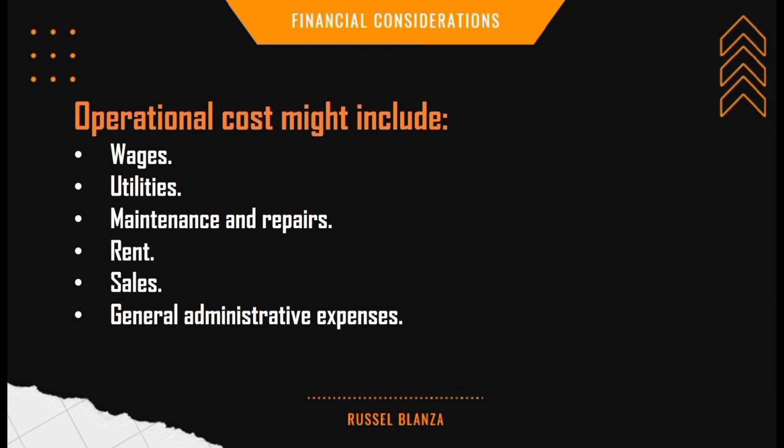Capital cost and operational cost can be seen as competing needs, with higher capital cost often resulting in lower operational cost, as a higher quality asset may have lower maintenance and repair costs, lower utilities costs, and so on. While sometimes, the division between capital and operational cost can be one of necessity, based on the resources available to the client at the time. It can be a calculated decision based on assessment of whole life cost.